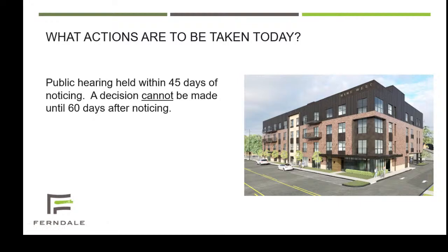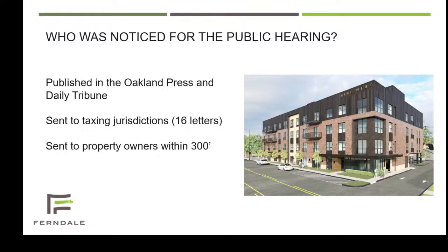So the public hearing must be held within 45 days of noticing, but a decision cannot be made until 60 days after the noticing. It was published in the Oakland Press and Daily Tribune. It was sent to all taxing jurisdictions and sent to all property owners within 300 feet.